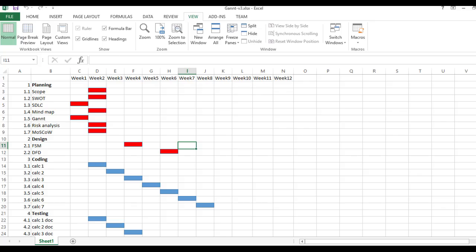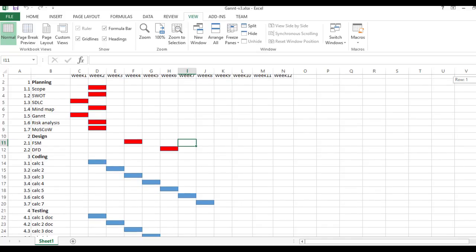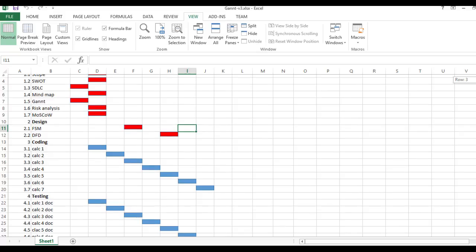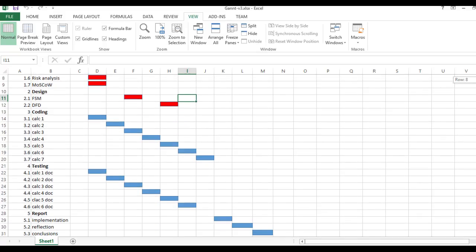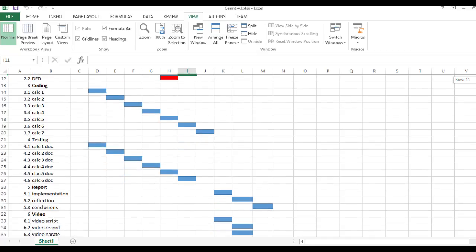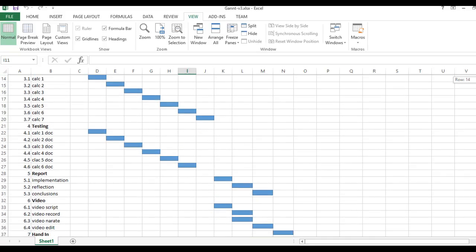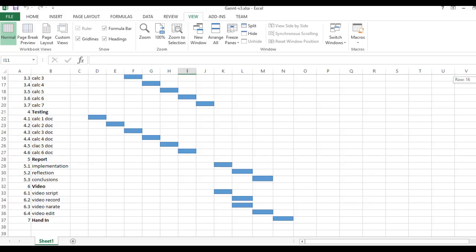The first thing that we did as a team was to go through the module guide and identify the key tasks. We entered these tasks into an Excel spreadsheet to create a list. Working from the lecture guide and assignment brief, we were able to place the tasks into some form of order and prioritise them. This also gave us an idea of timescales and helped us to break down the tasks into the groups for planning, designing, coding and testing. The Gantt chart we produced also allowed us to allocate tasks on a weekly basis to each of the group members.